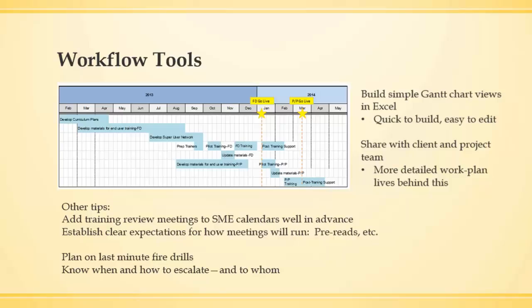And then one of the other things that can help you with the workflow is knowing when you have to raise your hand and go back to your client or go above somebody's head and say, I have been on Steve's calendar 3 times. He owes me an edit. He owes me a review. He keeps canceling meetings. My work is at risk if I can't get some time with Steve.